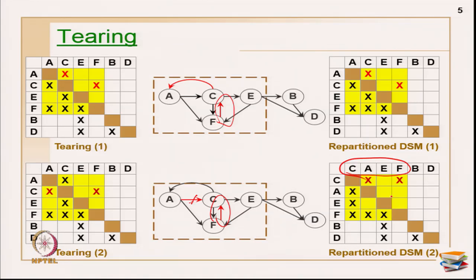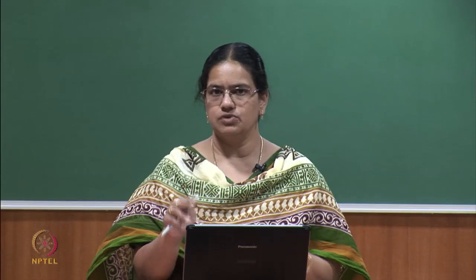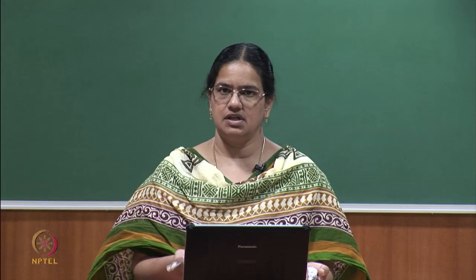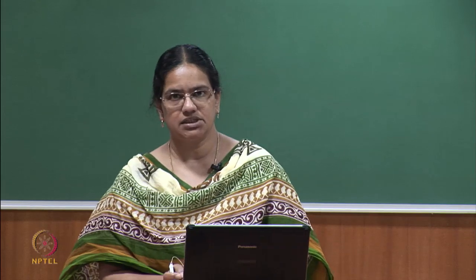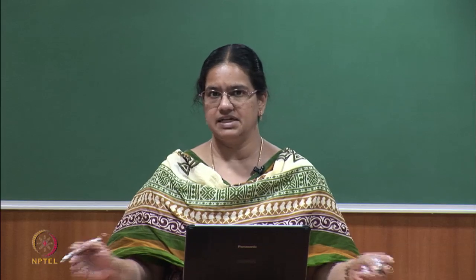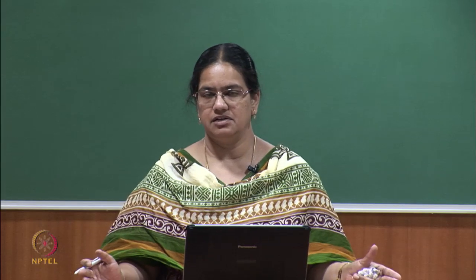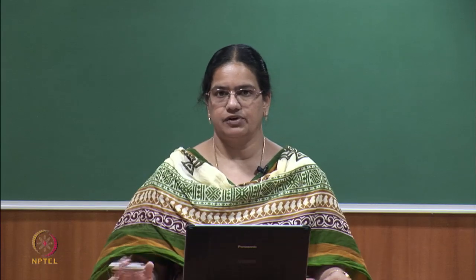Now, I am just wrapping up from the start till the end in formation of DSM. In formation of DSM, you had two steps: WBS in order to get the list of entities, for example, the list of activities, and multiplication of two DMMs in order to get an activity DSM just to get the X marks. Still you have to verify with the experts and refine your processes, and then you go into partitioning. In partitioning, it identifies all your sequential and independent activities, which implies the dependent and independent activities, and all your blocks are identified. Okay.